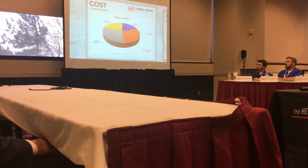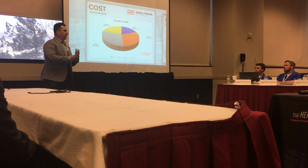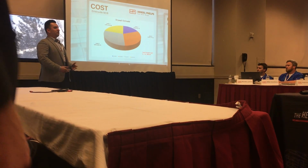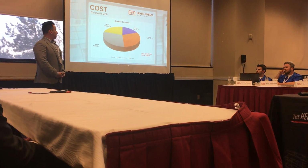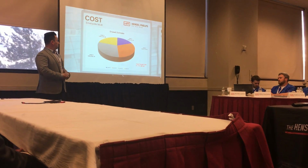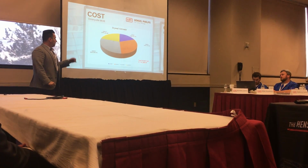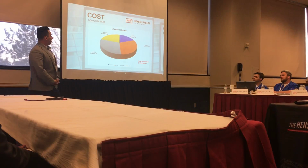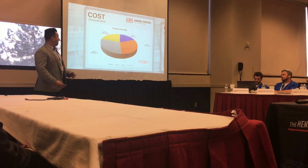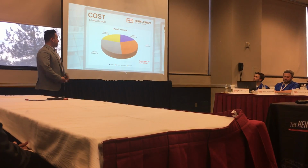Thank you, Loai. We also try to accommodate every need that our client has, especially when it comes to different changes in the cost. In this case, the client wanted a different wall partition layout, so we went ahead and did an estimate for that part. The overall estimated wall cost was $1.7 million, broken up here into levels 1 to 4, with level 2 being the highest cost level.